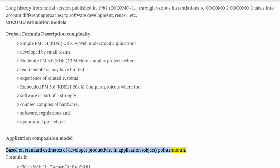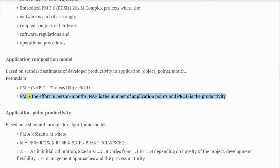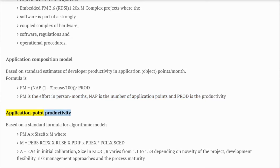Application composition model: based on standard estimates of developer productivity in application object points per month. Formula: PM = NAP × (1 - percent_reuse / 100) / PROD, where PM is effort in person-months, NAP is the number of application points, and PROD is the productivity.